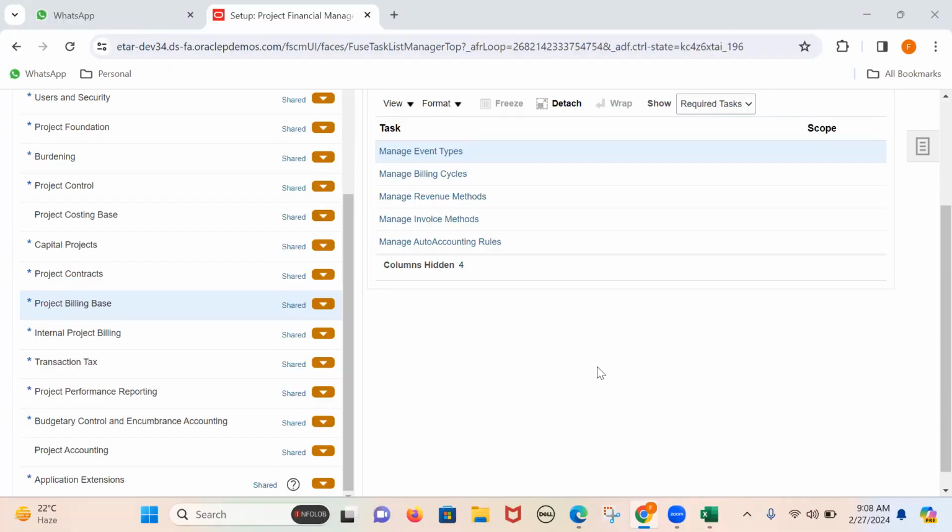So as per the last session discussion, we completely discussed the capital project end-to-end process. We created a project and made it active, and we booked the cost for the project. At the end of the day, we summarized the project expenses and converted them into an asset. For that, we transferred the project expenses from PPM into the Fixed Assets module.